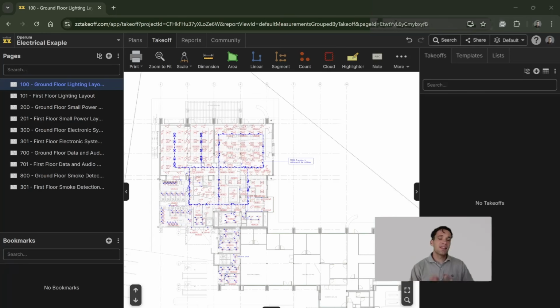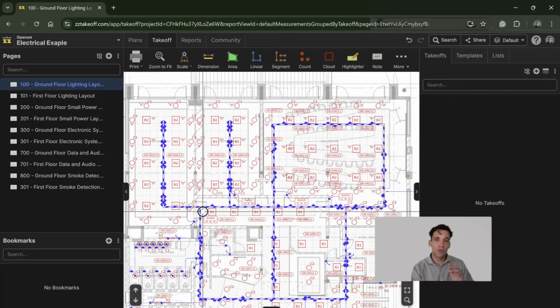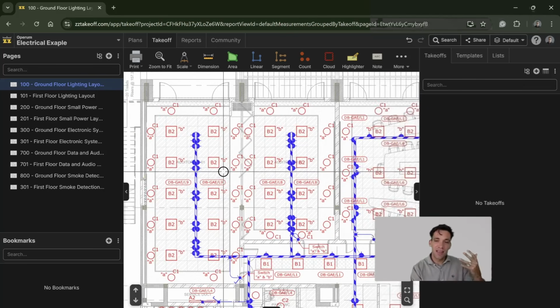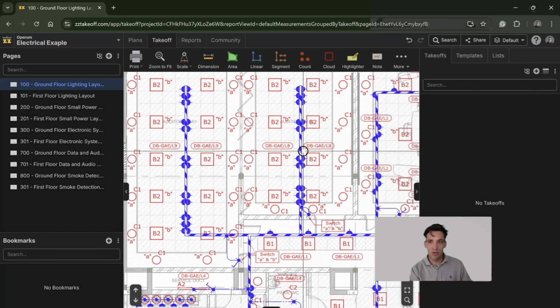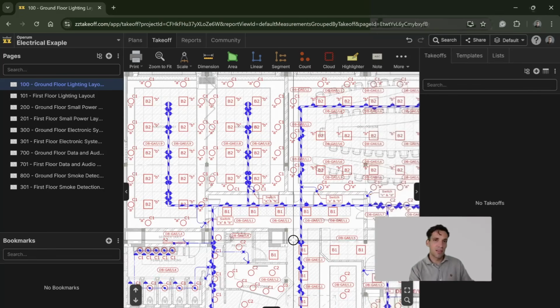So as I said, there's going to be 3 steps we go through in this process of doing a takeoff. So number 1 is going to be determining what we actually are going to measure on the drawings. These are the items that we can see, that we can easily count. For example, in this drawing, there is a number of light fittings to measure. We'll be measuring those, or we've got linear meters of cable tray.